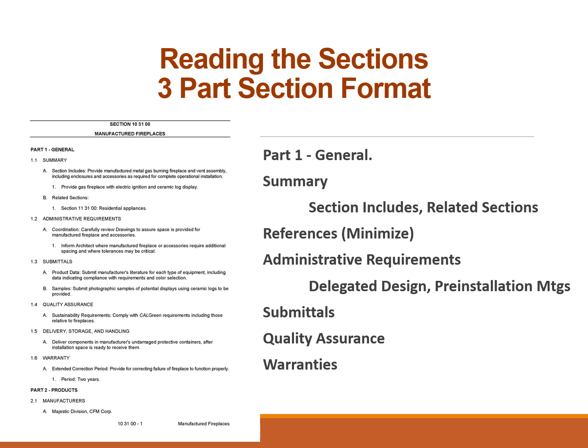And then basic submittals such as product data, shop drawings, samples, and testing requirements and testing reports. Quality assurance, which can be experience and work requiring all the products to be by a single manufacturer, and then warranties and extension of the correction work period. These are all basic requirements relevant to the administration of it, but not so important once you get out onto the job site.